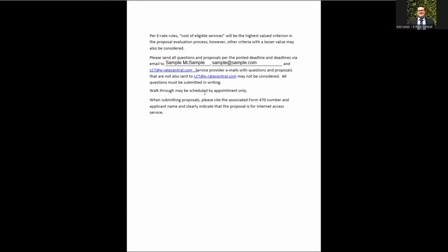Additionally, you may want to allow walkthroughs at the library. A walkthrough could be helpful to the service provider to help provide a more accurate quote based on the services that the library is going to require to install that new internet, whether it's a new circuit or an existing circuit or whatever the case may be, or if the library may need a leased router.